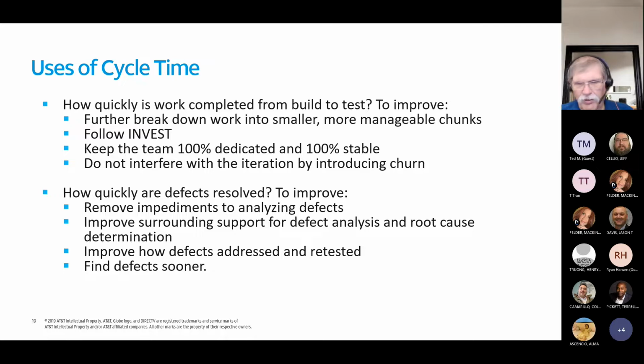But if you're pulling people off of work that they've started, they've got a context switch. They lose effectiveness by doing this. Okay, so we really want to keep introducing different things into an iteration to the iteration boundaries, so we can prioritize that new request in with the others in the backlog.